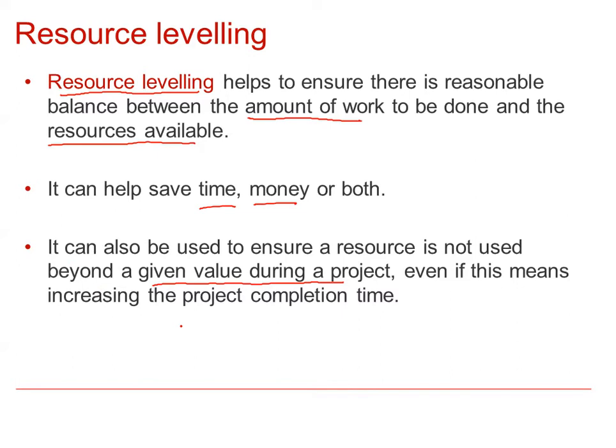For example, if our resource histogram found that 8 workers required 1 week and 12 workers required a second week, then resource leveling would help us work out if we could use 10 workers on week 1 and 10 workers on week 2 to complete the project on time.